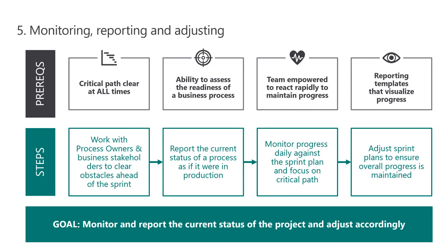Again, if you need to go to the design board for something, that should not be on the critical path. Things that go to the steering board should not be in the critical path. You should be looking ahead for these things and getting them reviewed and approved before they become a critical part of your project.